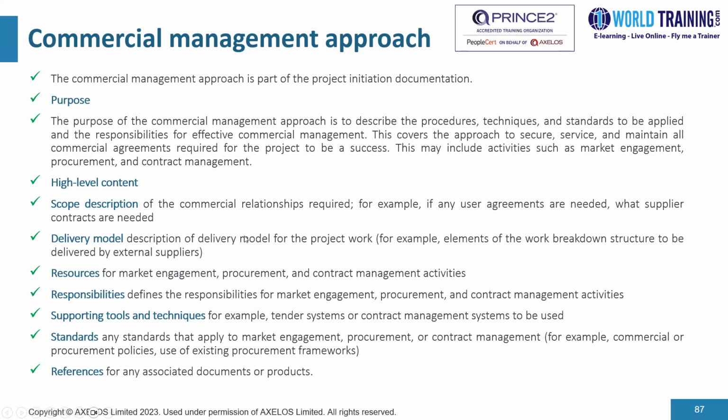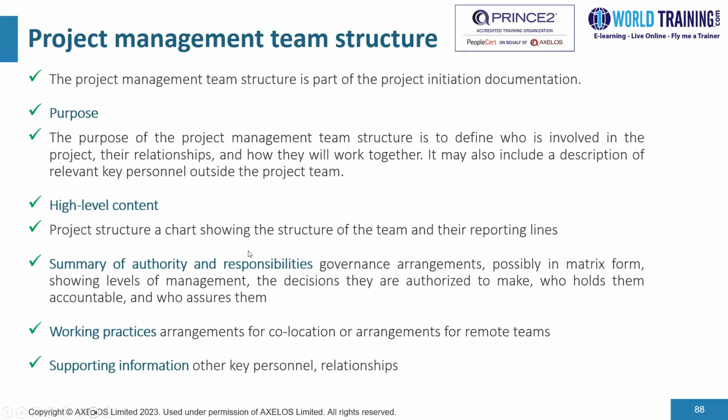So besides the commercial management approach, another document that is relevant to this practice is the project management team structure. It's a part of the PID document. The purpose is to define the project management team structure in terms of who is involved in the project, their relationships, and how they will work together. It may also include a description of relevant key personnel outside the project team.